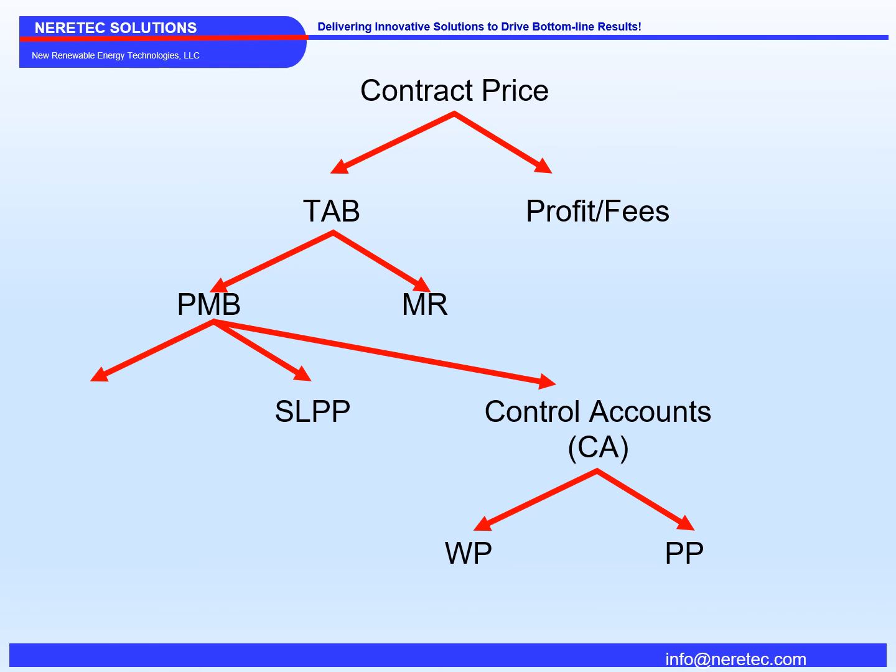The second component is what I will call the summary level planning packages. These are a far-term contract activity which have not yet been assigned to the control accounts. The last piece to discuss is going to be the undistributed budget. These are roughly defined activities not yet time-phased for distribution to control accounts or summary-level planning packages.